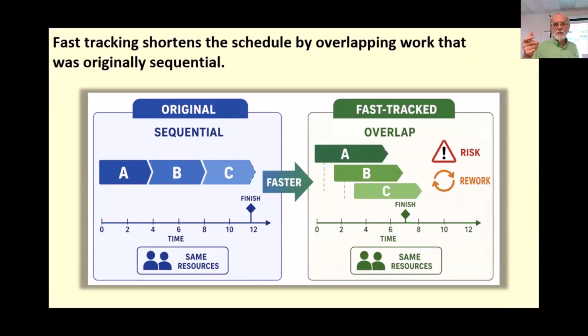But if I've got activity that, say, the same person is going to be doing several activities in a row and they're dependent on each other, and we're starting to get behind schedule, if you could substitute another person for that successor activity and maybe pull it ahead a little bit, so in a way you're kind of crashing because you're bringing an additional resource, but you're also assigning that resource to a different activity and bringing it forward. And now you have two people that are working on that one stream of schedule logic. It's a little complicated, but those are the kind of things that you can do.